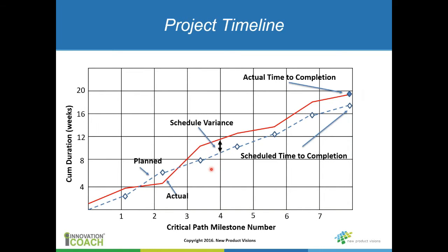Okay, the fourth section up on the right corner of that board is a project timeline. Now this is a nice graphical, quick way to communicate to the project team or anybody else that's coming by and looking at the board, management or so forth, where you are on the project. And the idea here is to identify the critical path milestones. Now this is just indicated in numbers.